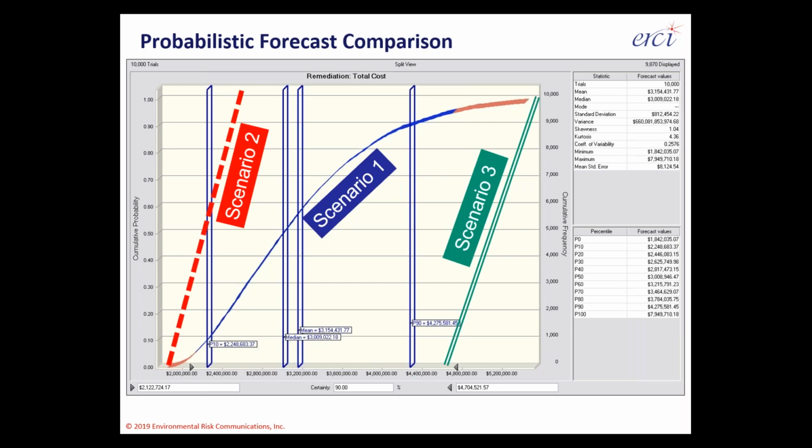Where you may have a need for comparison, where you're looking at scenario 1 versus 2 versus 3, this sort of display of a cumulative probability distribution gives you a very easy basis for saying, scenario 2, it looks like it's most competitive over every percentile of probability. Scenario 3 looks like it's uncompetitive with scenario 1 or 2 at every probability as we go from the lower left to upper right. So again, 3 is a scenario that you can, if you have the power to, like a technology selection, say, that's not something we're going to go for.